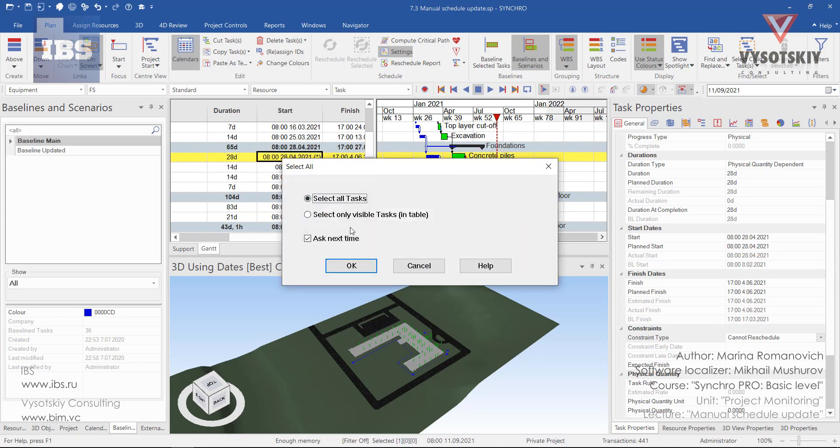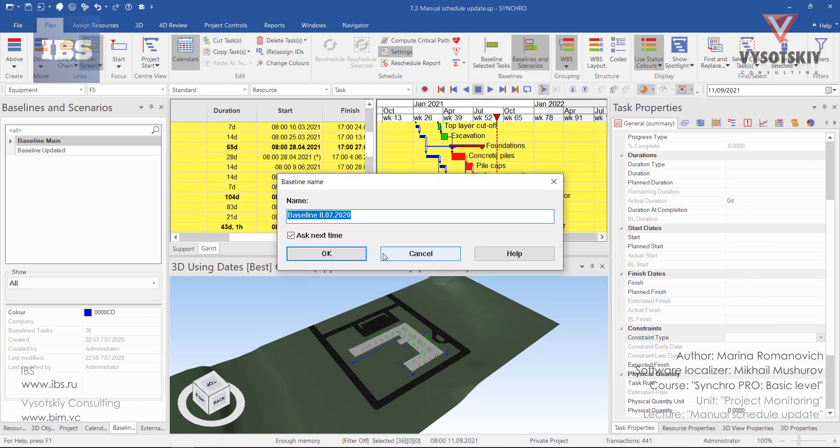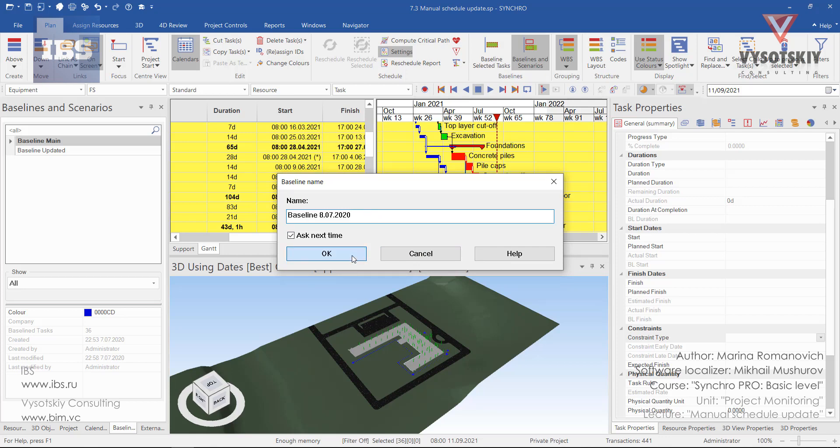Now select all activities by Ctrl-A and then again baseline these tasks. Let's leave this name as default, the name and today's date. Okay.